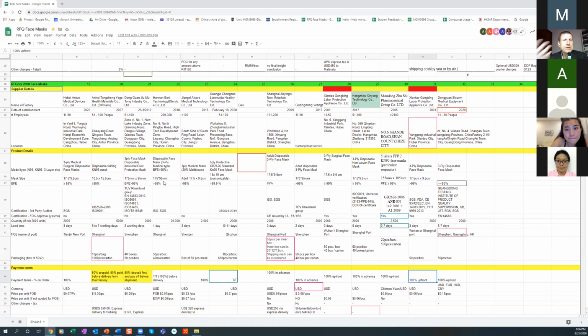So in theoretical terms, for those interested in theory, what that does is it creates switching costs. If you switch from one supplier to another, then you've got to do recertification, you've got to recheck, you've got to start to build up the trust again, you've got to go through the whole process again, and that costs you money, that costs you time.